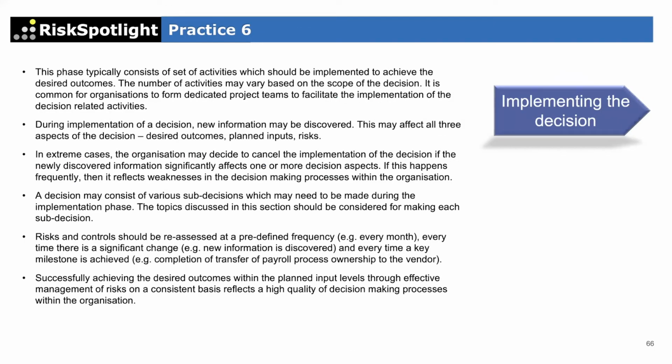And then you will implement the decision. This is where you'll have your change management program. Once you've decided, okay, let's go, we'll stick with SAP, but let's go on the cloud, the SAP cloud, then there will be an 8-month change management project, and risks need to be managed as part of that project. So again, operational risks need to be considered as part of that change management project.